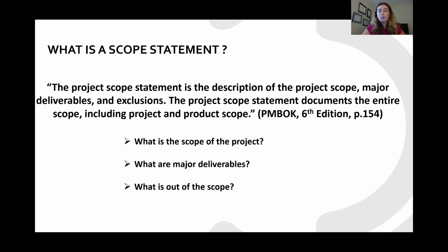So when we talk about the scope statement, which is going to be part of your assignment this week, make sure you define the scope of the project and the product, you outline the main deliverables, and then you highlight what is not in scope for the project.